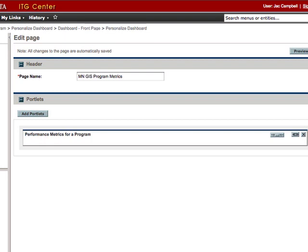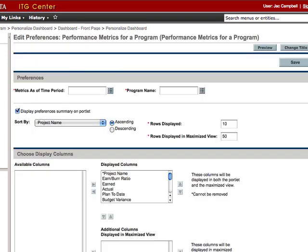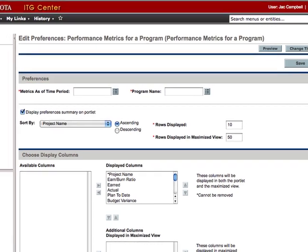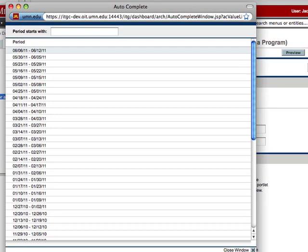To configure the metrics portlet, click the Edit button located on the top right corner of the portlet. There are two primary preferences that need to be set: the metrics as of time period and the program. The metrics as of time period is very important in determining what metrics get displayed in the portlet, and it is a value that you will likely need to update each time you view the metrics to ensure you are viewing the metrics for the desired time period. Metrics from the start of the program through whatever date is selected from the drop-down menu will be displayed in the portlet.